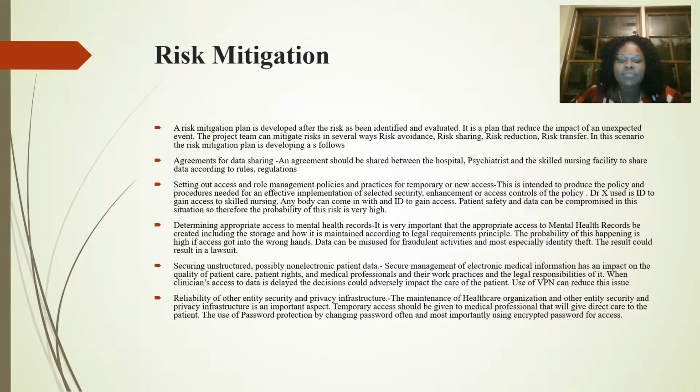The project team can mitigate risk in several ways: by avoidance, sharing, reduction, or transferring of risk. In this scenario, the risk mitigation plan is developed as follows. Agreement for data sharing, so that the doctor and the skilled facility should have some kind of agreement of data sharing according to the rules and regulations of both parties involved.